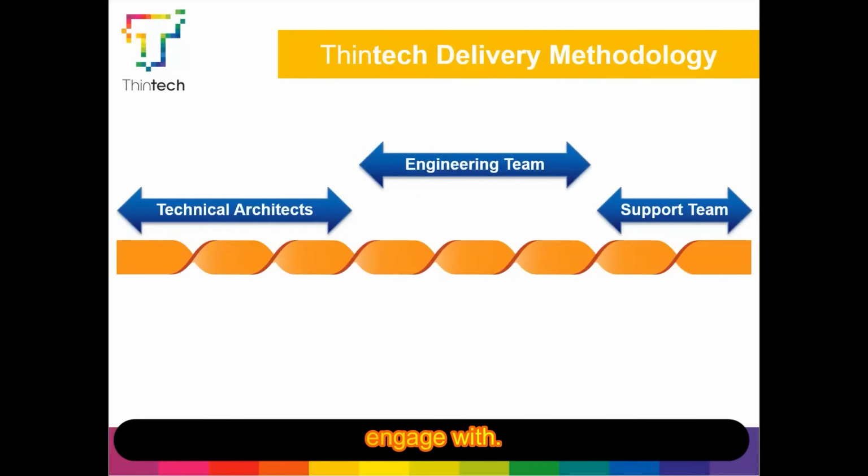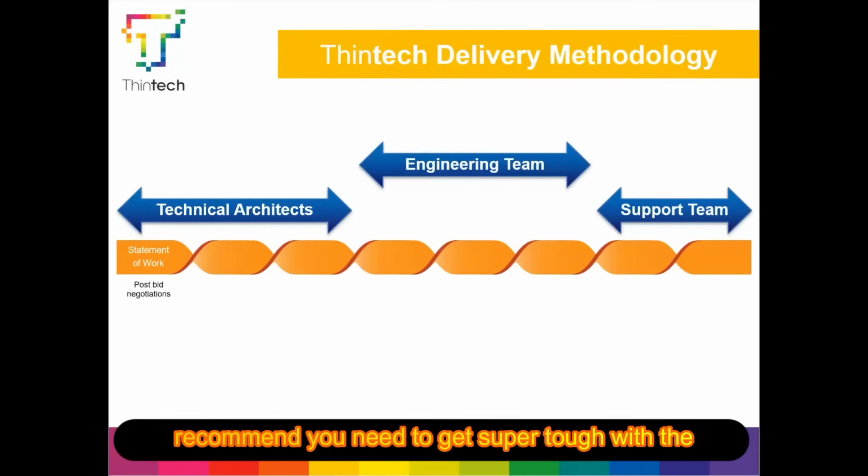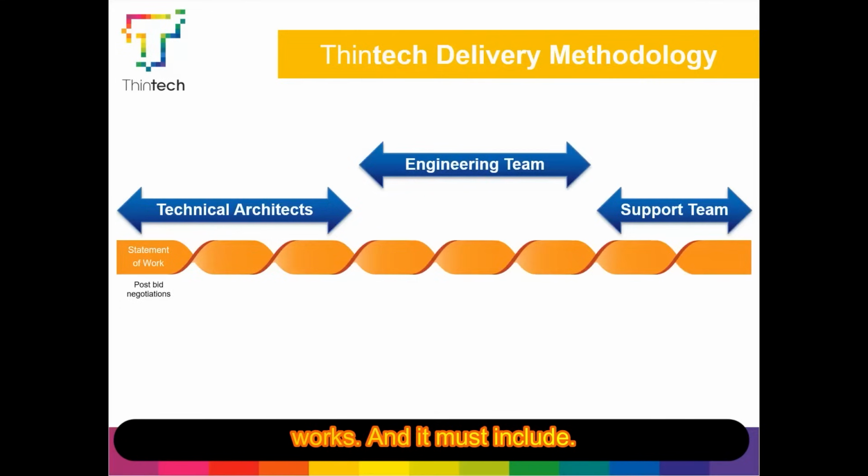They need to engage with all levels of the business. And if you really want to get tough, and I highly recommend you get super tough with the architect, you can force them to take responsibility for the design by agreeing stage payments with them at key milestones. So I highly recommend you do that. Get them to produce full statements of works, and I recommend that they have the following headers.